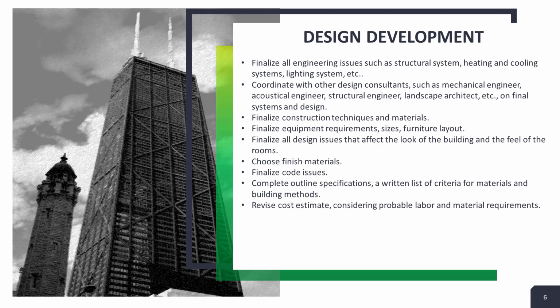The aim is to finalize all design decisions before proceeding with construction documents. A more detailed cost estimate may be provided at this phase, and typically is. In smaller projects, design development may become part of the schematic and construction document phases rather than being a distinct phase of its own. The design development package will be reviewed with the client before proceeding further with the project.